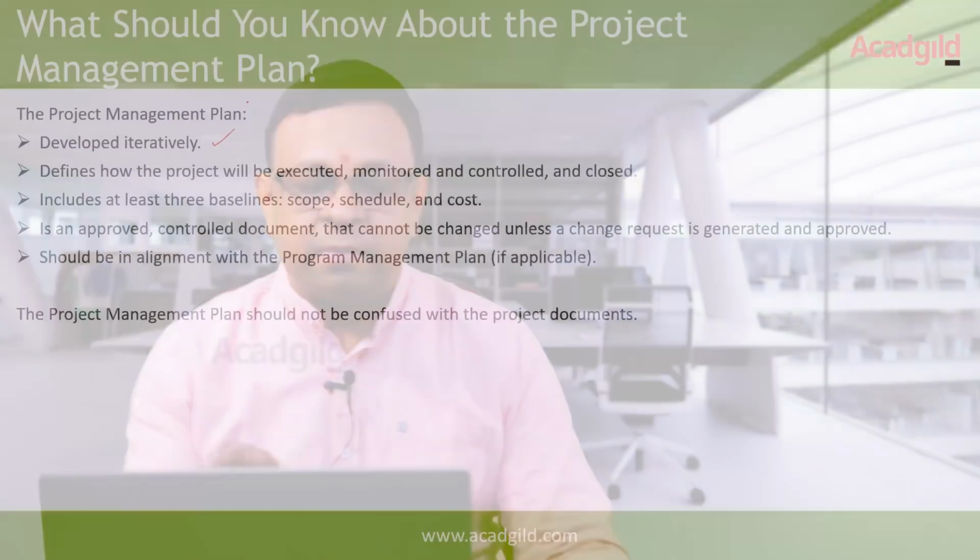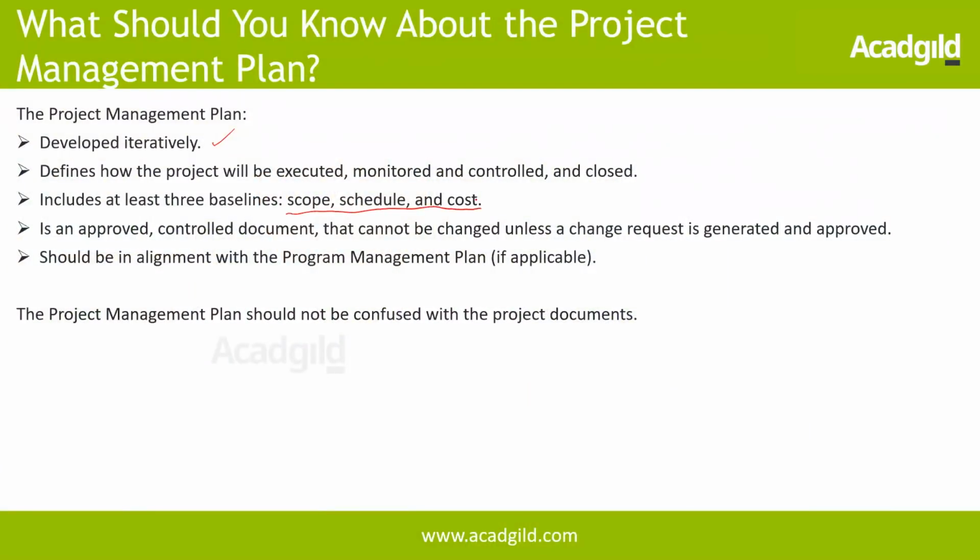And this project management plan, the set of documents that I mentioned, is the project management plan as a document and the other 9 subsidiary plans as a document. The 3 other things that are going to be a key part of this project management plan: if I want to baseline a project management plan, then I need to have the other 3 baselines, which are nothing but scope, schedule, and cost. So I need to baseline my scope, my schedule, and my cost. Which we have already seen, it's nothing but the triple constraints.